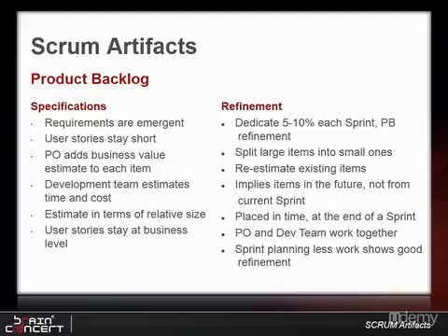Third, product owners prioritize the backlog, usually just the release backlog subset, to maximize return on investment by choosing items of high value with low effort, or secondarily to reduce some major risks.